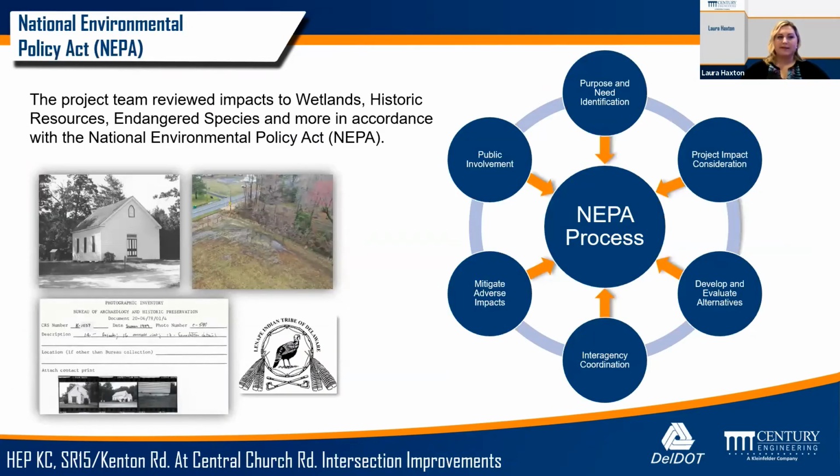NEPA, what is NEPA? NEPA is the National Environmental Policy Act. This is a decision-making process that all federally funded projects are required to use to help determine impacts and ways to minimize and avoid adverse environmental effects. We look at wetlands, historic resources, endangered species. For this project in particular, we did a wetland analysis, and the historic standing structures, archaeology, and endangered species analysis is ongoing.